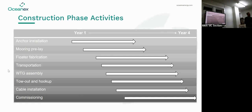So we have a mooring spread, we might have 4 moorings for 100 turbines. There's 400 moorings out there. They won't happen. You're not going to have time to do all your moorings and then come and do the next bit and then come and do the next bit. So it becomes a real logistical challenge, almost more than an engineering challenge. It's the logistics challenge of how you overlap all of these construction activities for, let's say 4 years.